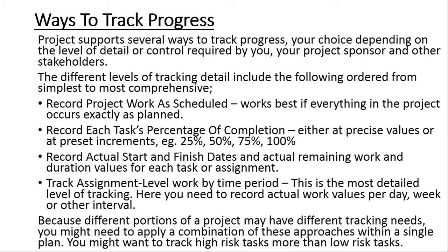Then the third method is for recording actual start and finish dates and actual remaining work and duration values for each task or assignment. In this case, we are not recording percentages, but we are recording actual values of the start date, finish date, the remaining work, and the duration values.